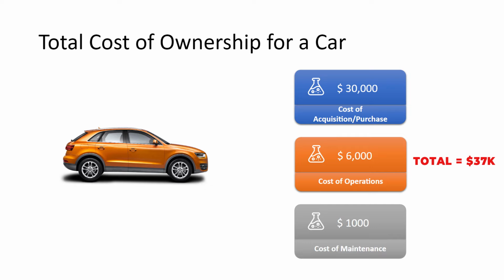So how is the total cost for a software, or total cost of change, calculated for a project? In the car case, we used 5 years to calculate the total cost. In the case of machinery or a car, there is a life expectancy. But in case of software, life expectancy is typically not very well known. So organizations use some kind of a thumb rule to assume the life expectancy. Let's say it's 3 to 5 years, which is a common assumption.